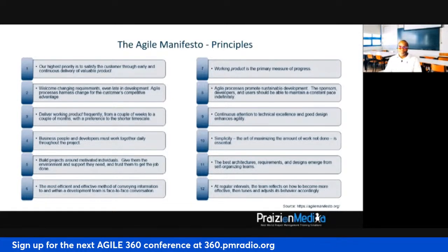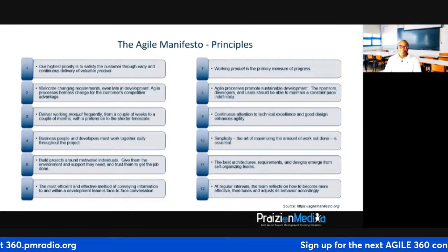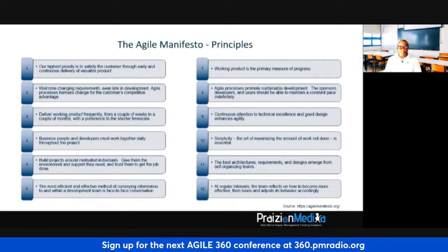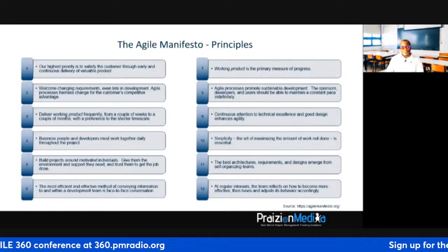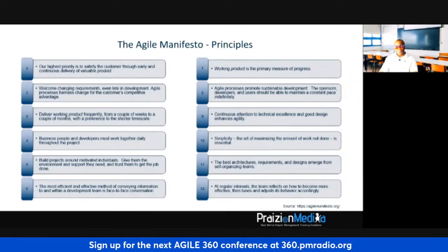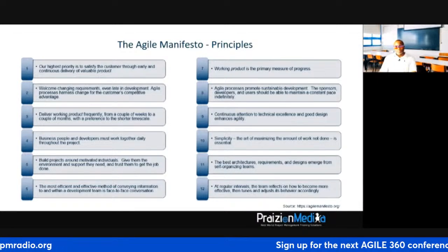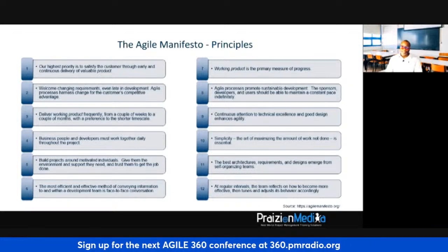So a lot of times the retrospective would happen at the end of a sprint. But in the Agile community, very recently, we have begun to embrace the idea of a retrospective not having to wait until the end of a sprint. You could have a retrospective at any time the team feels they need to. So instead of waiting till the end of the sprint before you make a correction, if you wanted to make a correction right now, you could. But it has to, of course, be with reflection. And it's not just a one-person thing, it's a team thing.